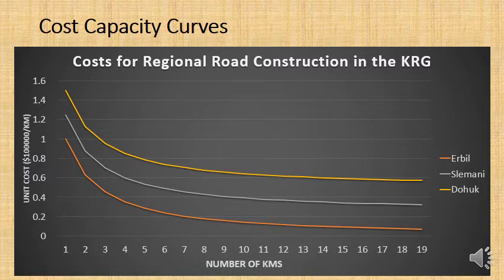So here, this is a curve that is being built for roads with historical projects that ranged from 1 kilometre to 19 kilometres. If you are going to extrapolate and try and estimate the cost of a road that is going to be 30 kilometres long, well, that's going to make it less accurate, because you have no idea how the data will behave outside of the given data range that was used to model this data.